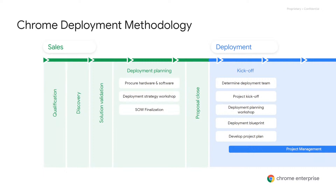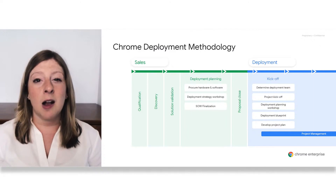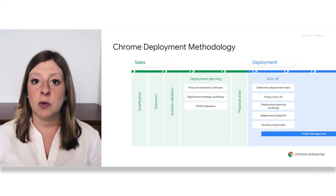As you determine what your deployment team will look like, we'll be able to identify what team members will be focused on what, and get a good sense of what your project plan will look like. The project kickoff will start initially with your account team, where you'll develop your deployment blueprint, develop your project plan, and figure out what milestones you want to have accomplished. A deployment can really last anywhere from three to six months, but depending on the organization, it can be shorter or longer depending on the size and the use cases and barriers you might run into.